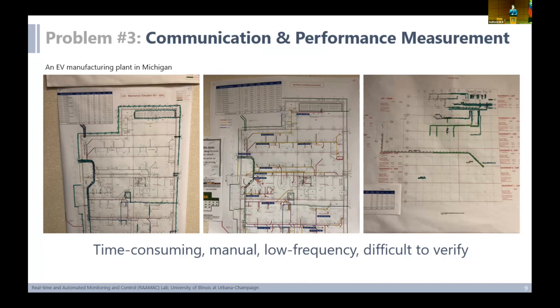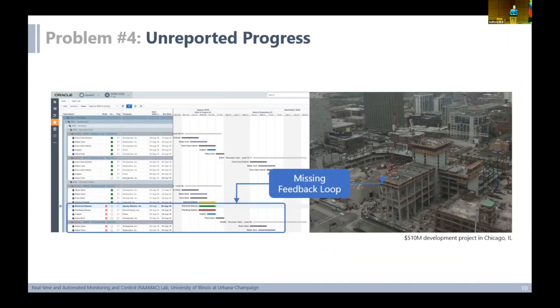I'm going to give you another example. One of the hottest areas of construction in the United States is data centers. We build a lot of data centers: Facebook, Microsoft, Amazon. These are $500 million projects each, done in 10 months. So you're looking at about $5 million of construction work a day. If you're losing 5 days of work to understand that you had a problem, you have a big problem to solve. But the problem is also slightly different. Where do you want to have that feedback? Do you really want to understand progress compared against your 2D, or do you want to have that against your plan to begin with?